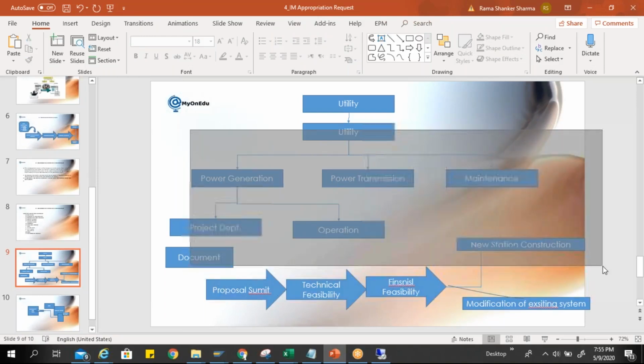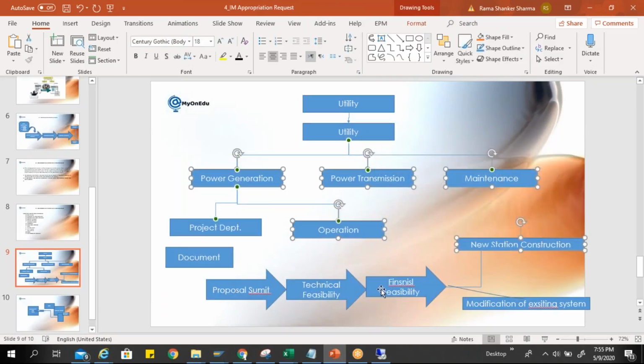Okay, this portion, you are directly creating a project, and based on the project type or project profile you can keep some dashboard. There is no place where you are making a group of similar kinds of projects. There is no control at department level, at the investment level, position level, right? So if you are applying IM, that is the additional benefit.